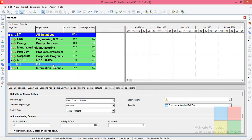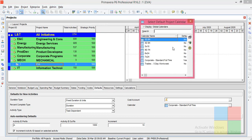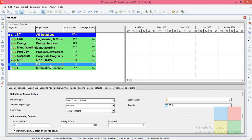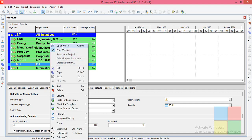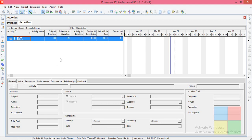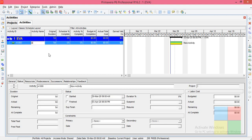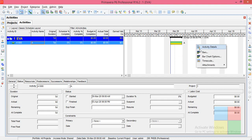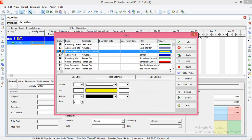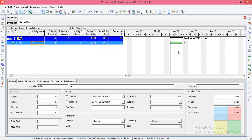So we have our project here. Let us assign a calendar — go to Default, go to Calendar, select a calendar. Now open the project. We are on the Activities window. Let us add an activity — Activity A. In case you see any baseline bars, just right-click, go to Bars, and switch it off, because what you see there is not the proper baseline — we will have to create it later.